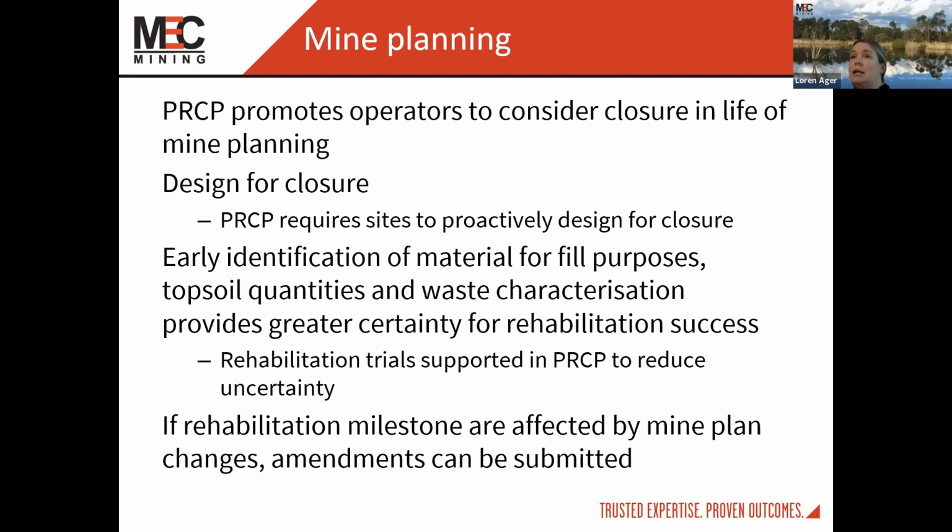So selective mining is one of those things that we need to be focusing a little bit more on, because there will be a requirement for you to move topsoil or inert material back to these rehabilitation areas. If it is not planned for in the mine planning space, we will see huge costs in terms of rehandle or the need to actually bring in materials which are insufficient on current mine sites.